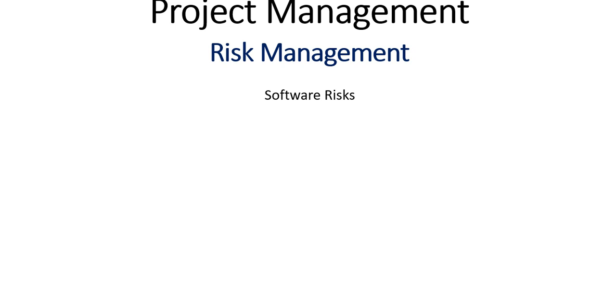The risks, the project risks, they affect schedule or resources. Product risks affect the quality or performance of the software being developed. Business risks affect the organization developing or the organization that you are developing for. So we've got many risks.